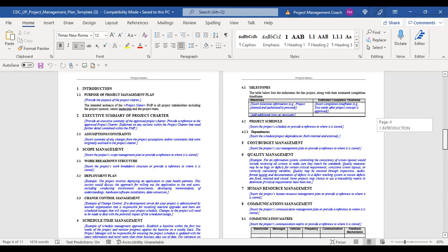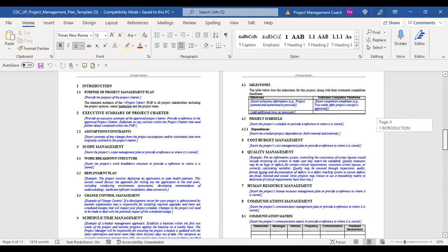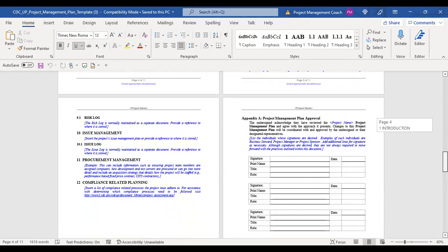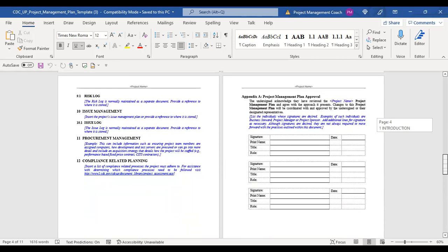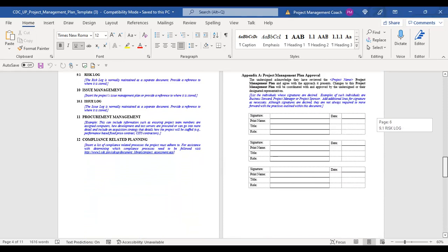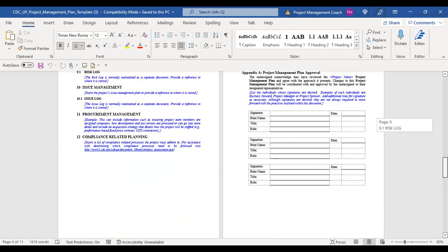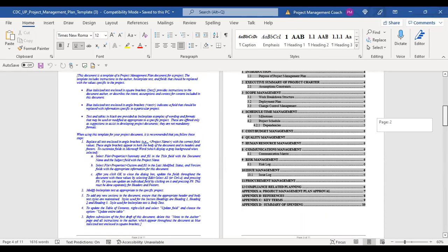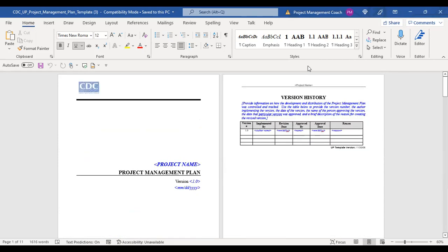Depending on your unique circumstance, your unique project, your unique PMO, this could be something management wants to see and wants to control to a very high degree or not. It depends on your organization. But the key thing is once we have baselined this project management plan, it can only be changed through the formal change control procedures. Consequently, change requests are going to be generated and decided upon whenever a change is requested. You do need to be aware of that for your exam.